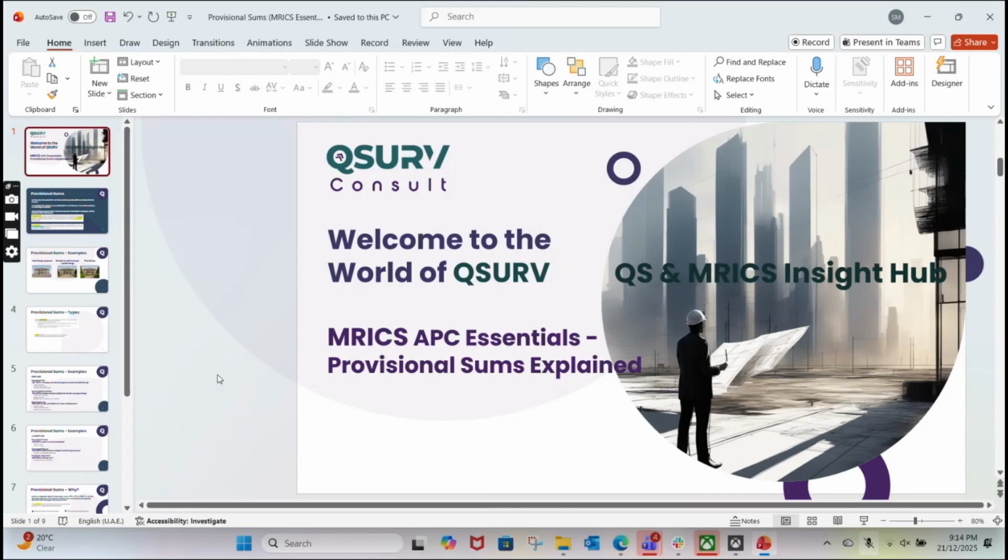If you have enough time, maybe you can go for B grade contractors, if you are okay with that and have a very strong technical and supervision team, and control the quality from your side. Or else, if time permits, you can go for redesign and optimization, introducing a new smart system to reduce the cost. And third, reduce the duration so that at least you will save some prelims out of it. Other than that, in my experience and knowledge, I don't see much, Ahmed.